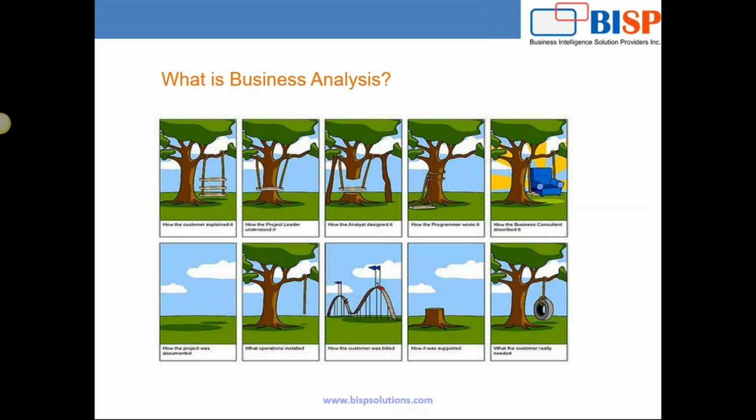And once the mockup has been approved, the BA is going to prepare different documents. The BA is going to prepare a BRD document, that is a business requirement document. SRS document, that is a software requirement specification document. Requirement traceability matrix document. The BA is going to prepare different diagrams like use case diagram, activity diagram, sequence diagram. With the help of these diagrams and the documentation, all your team members will be on the same page. These documents and diagrams will be helpful to the stakeholder so that he can review all the requirements once and he can give the confirmation.